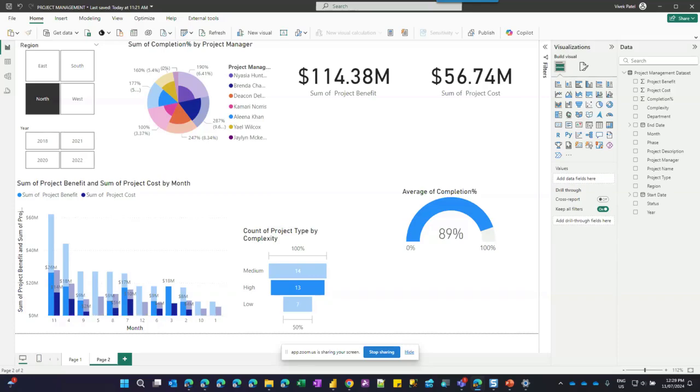Yeah, so I will start by saying that your reporting could be as simple as my task list: how many are in a project, how many completed. I just want to track the late tasks. Start time and end time are there, and if today's date is past the end time, then I'm late.